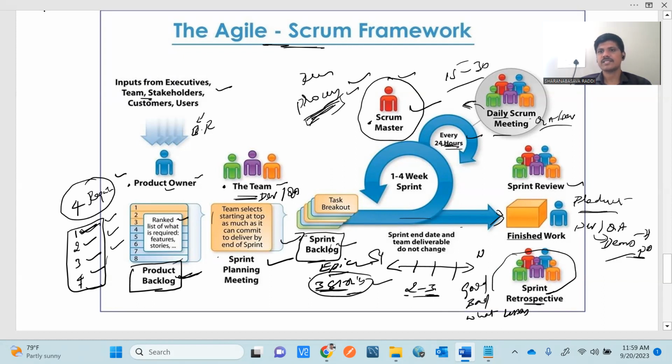Okay, for example, in the Scrum meeting or in the daily stand-up, if somebody is facing some issues and that is called out, for example, I am a tester and I am working in the current sprint on some story, and there might be some blocker. For example, the environment is not stable. If I call out that issue in the Scrum meeting, then the Scrum Master is the person to take care of that issue. The Scrum Master communicates that issue to the high level administrative people, so that the blocker will get resolved as early as possible, so that I can proceed with my work.